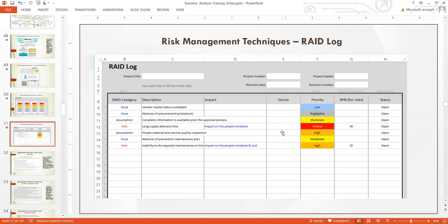So after that timeline, automatically the risk, if you cannot close that risk before the due date, automatically the risk will trigger to the next line management. It will escalate itself to the line management. So even if you as a junior officer is trying to cover something, there's no way you can cover something because it's programmed that way.